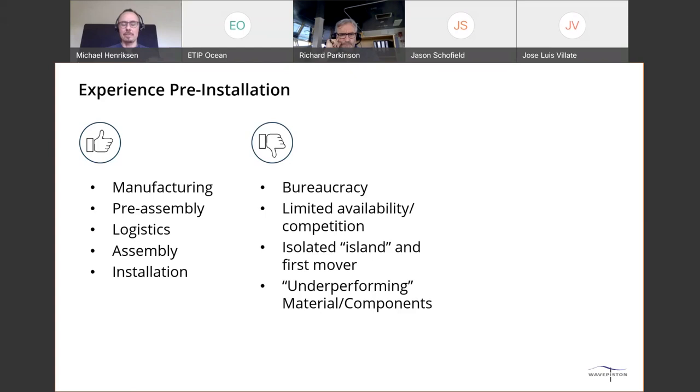So we had to pay different people. We had to get different parties in, which we're not used to, because working in the North Sea and the West Coast of Denmark, we got a general approval and then we just work. Here it was every time we did something that we needed to do something extra or get some extra approvals or procedures, which is, of course, a bit frustrating when we're talking about also part of the development.